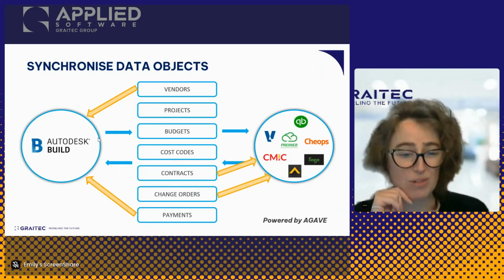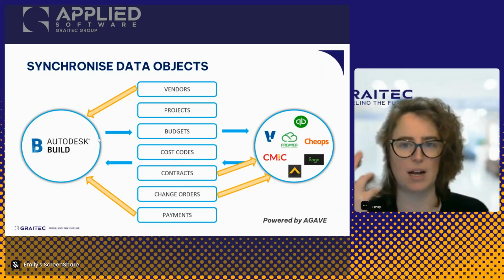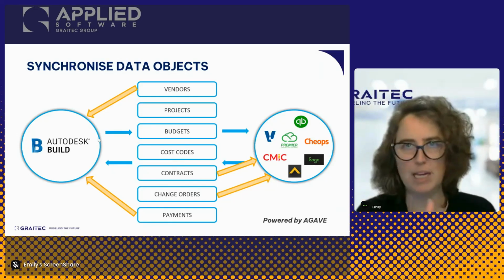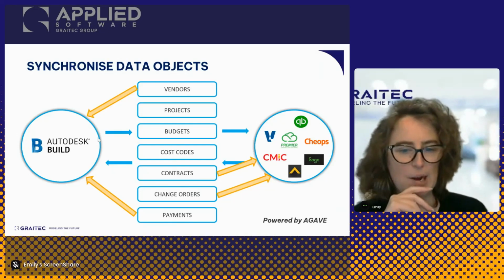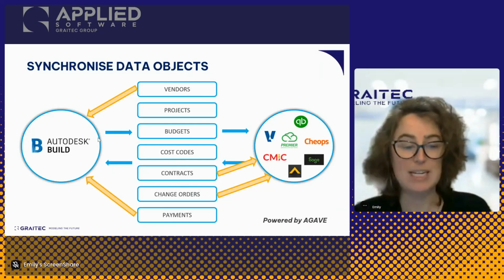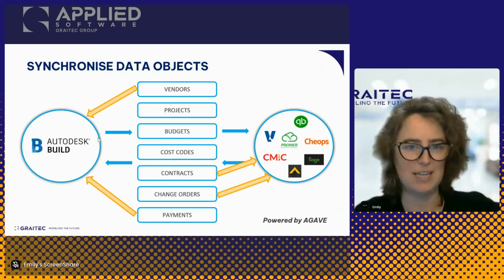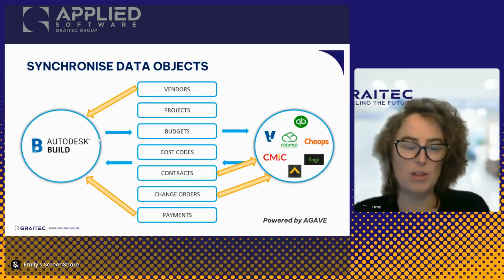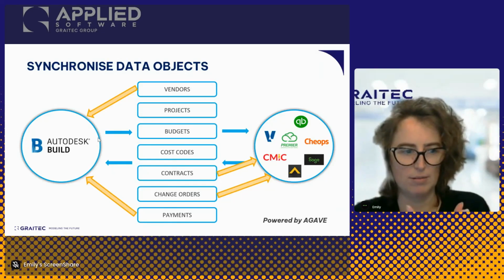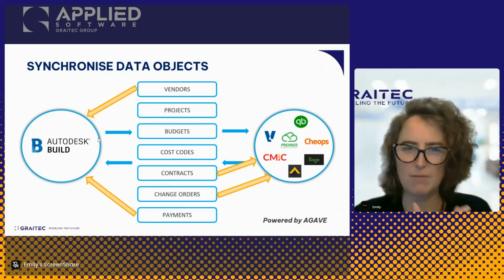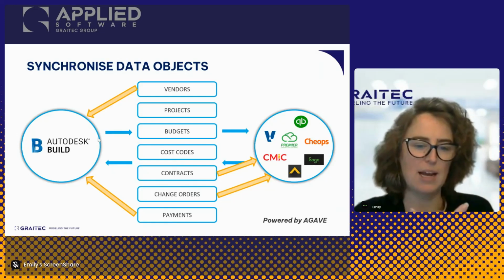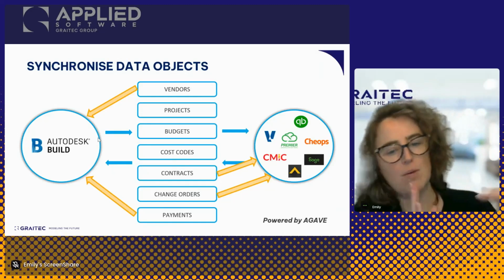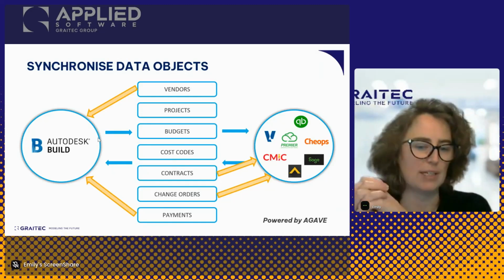In addition, we have contracts and change orders. So contracts is a list of your contracts, subcontracts, vendors, internal contracts that you are creating throughout the project. And this often is initiated in the Build side. So we're going to build our contracts on the Build side because that's where the structure exists for that format of item. And then we're going to take that executed contract when it's been all signed and sorted out, and we're going to push it into your accounting system.